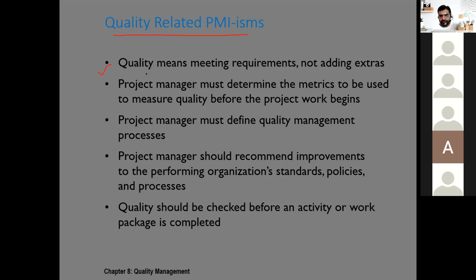Quality means meeting requirements, not adding extras. This is a very important point. We really don't want any gold plating. Gold plating on projects is not allowed. If you completed the project under budget within the schedule, it's all right. Return the resources, return the budget, return the leftover money to your project sponsor.